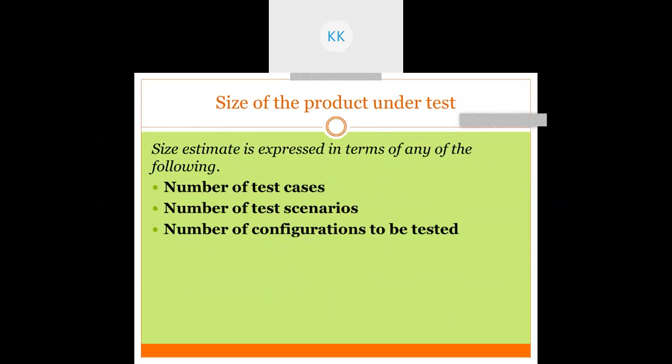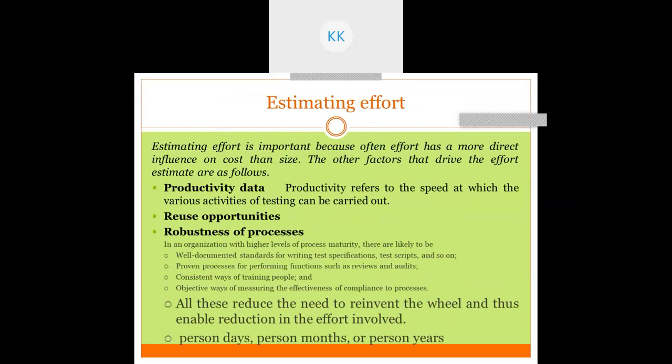Size estimate is expressed in terms of any of the following. For testing, we can write the number of test cases, the number of test scenarios, the number of configurations to be tested. That can define the size for the test.